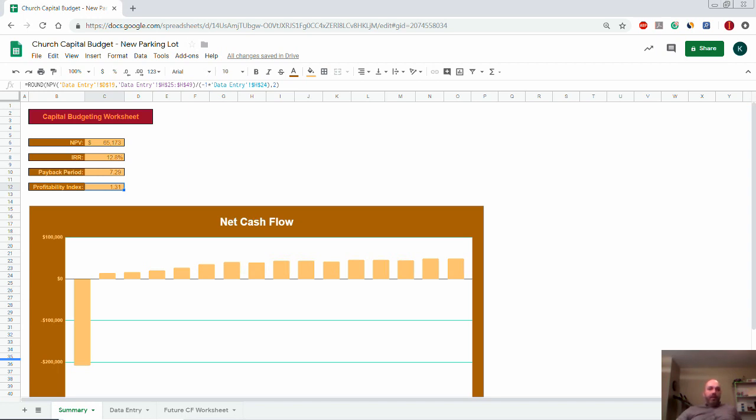but it's 31% in essence, 1.31, and you don't have any other projects to compare it to, but that kind of makes it like, well, what does that mean? Is that good, bad? I mean, it serves as a comparison tool between different projects. If you're just doing one project, then, is the NPV positive and this is your only option in terms of projects? Well, then go ahead and do it. If you're comparing projects, then that's where the profitability index would come into play, so you can, like I said, compare which one's preferable, which ones are preferable, might be plural.